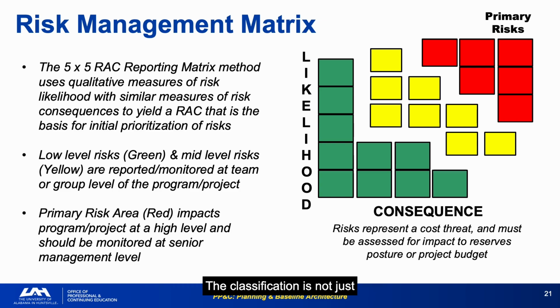The classification is not just descriptive. It determines who owns the mitigation. Risks represent a cost threat and must be assessed for impact to reserves posture or project budget. This is the link between the risk matrix and the UFE calculation. High consequence, high likelihood risks must be funded in the reserve.